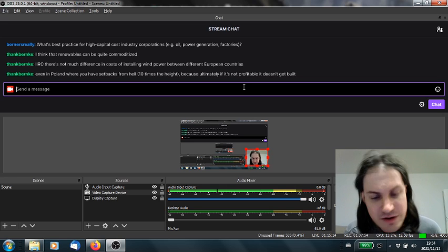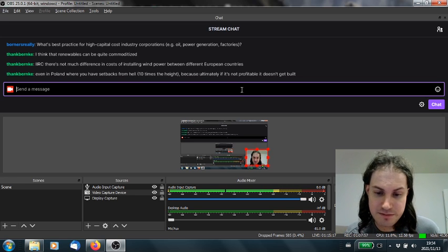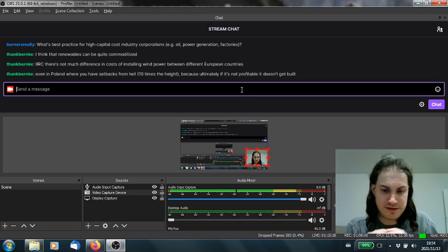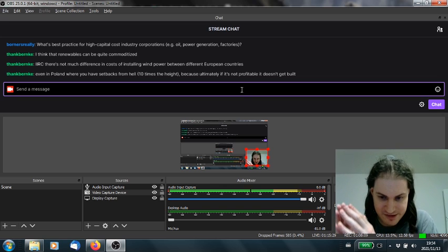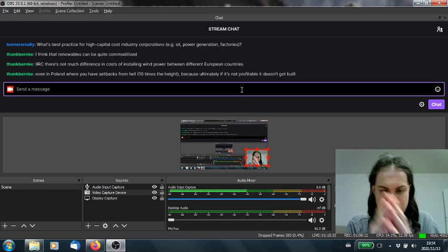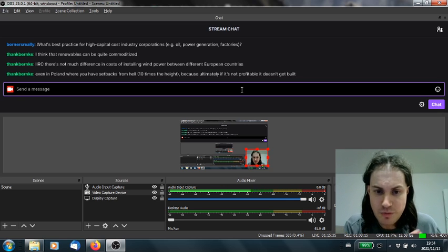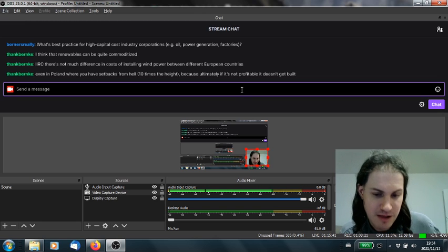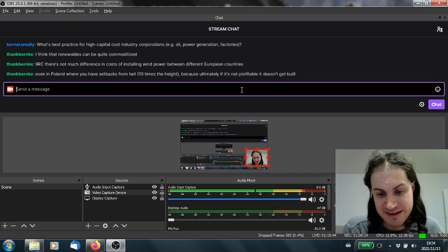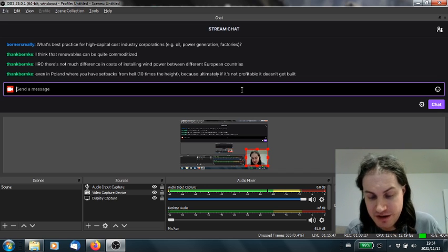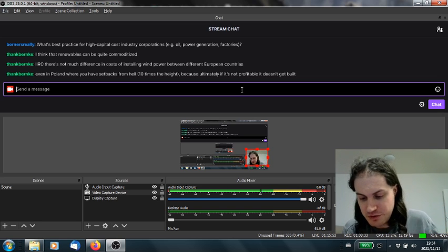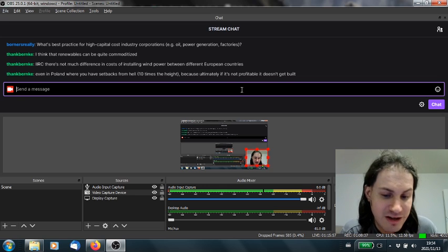That said, in Turkey, they don't actually do pure design build. In Turkey, they do design build where the preliminary design is contracted. It's just not design contract, bid it, and then build contract. It's 60% design, bid it to 100% plus build, which is actually a pretty good way of doing this. So another thing you want to make sure is you have a lot of flexibility. The builders have to have a lot of flexibility to do little changes to the design. Again, in Turkey, it's codified as 60% design, and then you can flexibly go to 100% however you'd like, and that's fine.